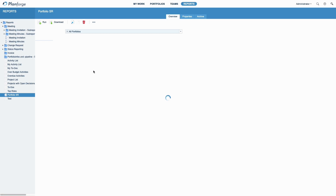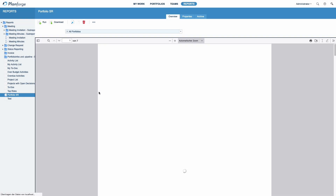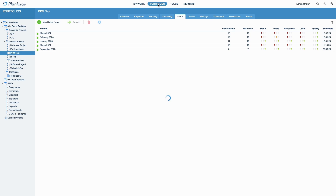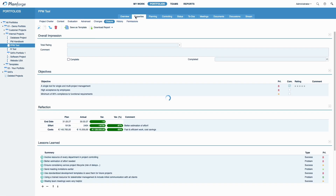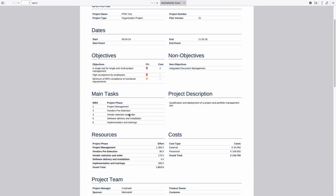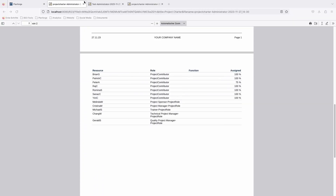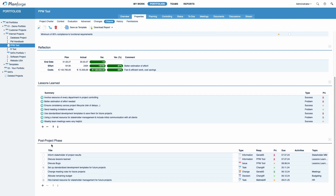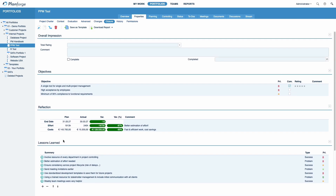In addition to PlanForge's Reports area, you can access customizable Project Charter and Project Closure reports directly in the Portfolios area. Navigate to any project, click Properties, Project Charter and download the report. This is what a Project Charter report looks like. Now, click Closure. PlanForge's Project Closure report includes star ratings, lessons learned and post-project to-dos. Edit this section whenever you want. Once you have completed your project, you can also download your final Project Closure report.